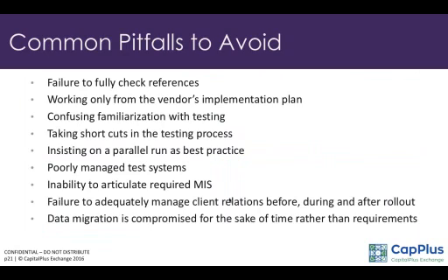Take, for instance, if it's a loan, if you're keying in a loan application, you have to ensure that the application is keyed in, and you go through the process, and it's sent to the credit evaluation committee online or printed or whatever the process is, and they approve it online, saying that this is fine or this is not fine, and it goes through that cycle. You need to ensure that all those steps are tested, and that is what you call testing, not just looking at a screen and putting in some data.